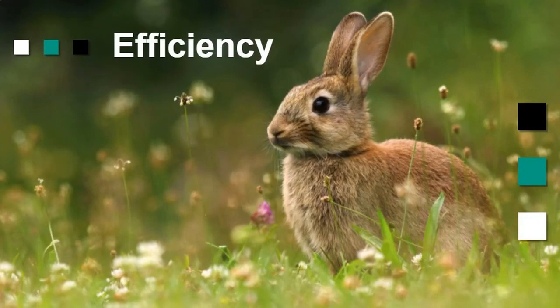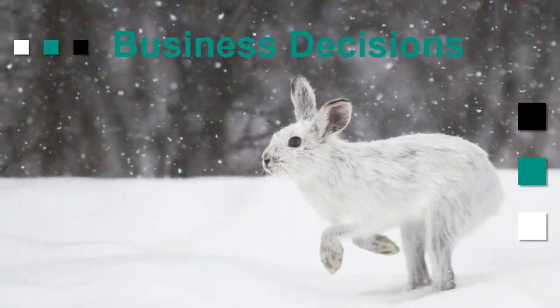First of all, it takes a lot of work to get them set up, and you're dealing with live P6 data. And if you're a scheduler, and most of you probably are, you know that you F9 at least probably 10 times a day. So the reports that someone's seeing off live data can be changed even 2 minutes after they've been published. Okay, so the idea of going after live data is not a very good game plan. Now we're trying to get all the important information from P6 into the right people's hands so that they can make those business decisions. That's the whole objective.